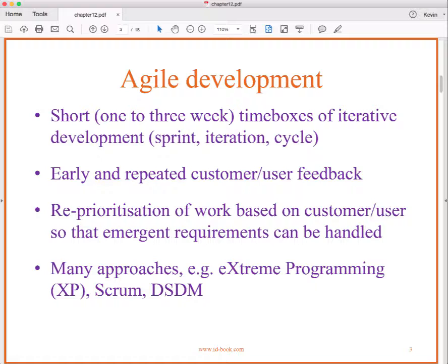The most popular of these is a methodology called Scrum, and in Scrum, the iteration is called a sprint. And they're probably 2 to 4 weeks long. I see that we say on the slide here 1 to 4, but I think 2 to 4 would be more appropriate. Okay.